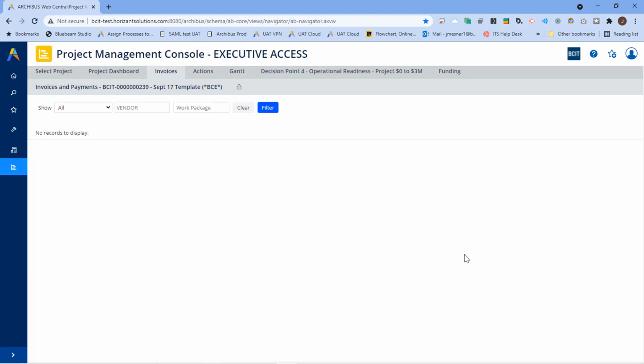So between stages 3 and 4, Jonathan, we have no influence over that because it does go to BCIT Central Finance. The only action we get is once it's actually been paid, we get notification. That's when Archibus does get updated. We are looking at an API that does link us back into Banner to pull that information, but still that is dependent on BCIT financing processing our request to pay an invoice. So there's still, it's anywhere between probably 2 and 6 weeks right now.